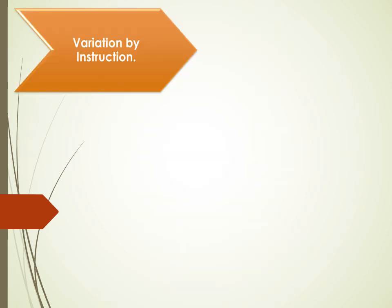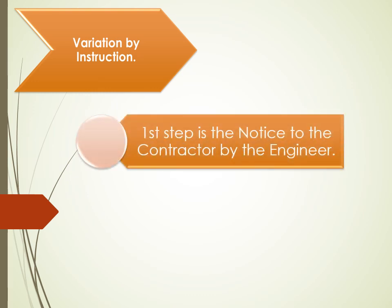Variation by Instruction. The first step is the Notice to the Contractor by the Engineer. In accordance with Subclause 3.5 Engineer's Instructions, the Engineer gives a notice that defines and describes the required changes and requirements for the recording of the costs.